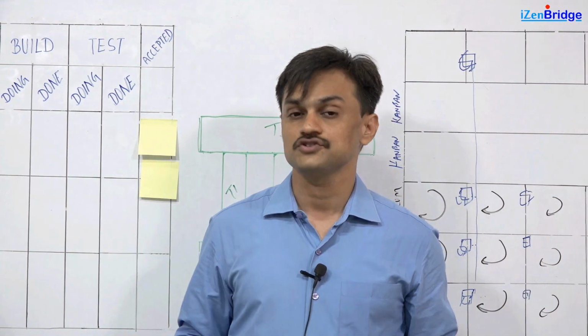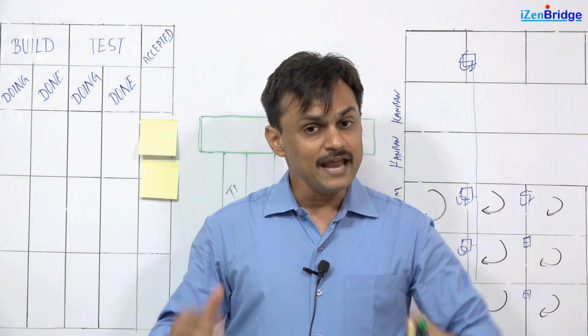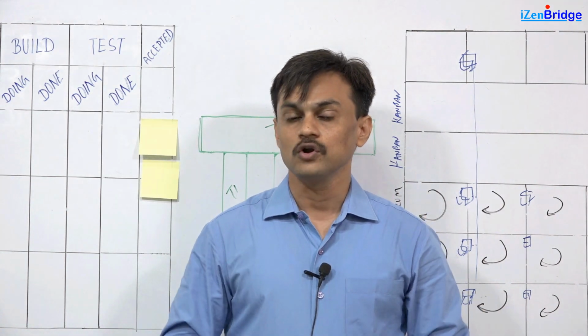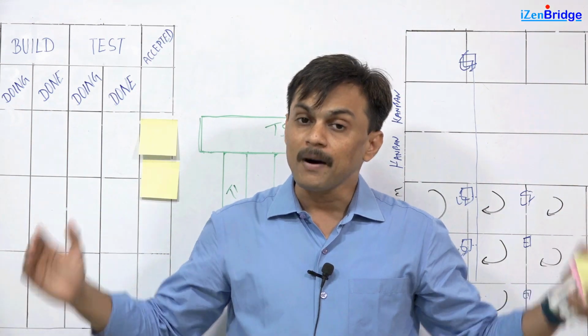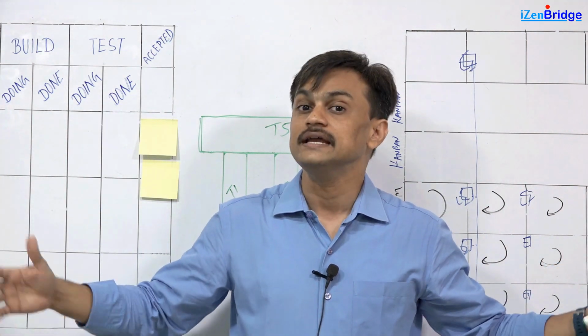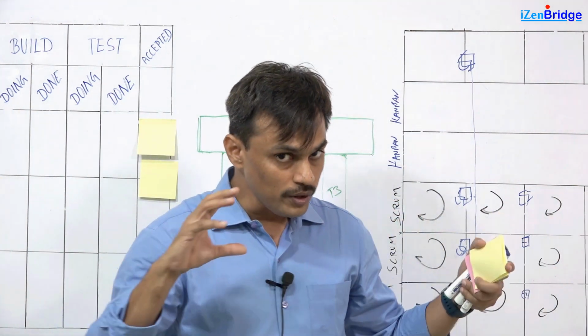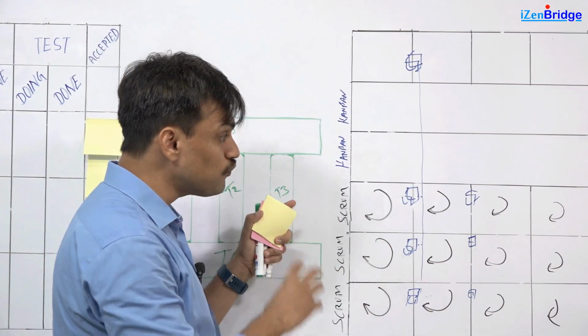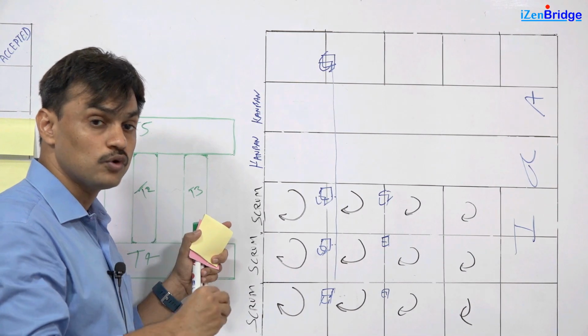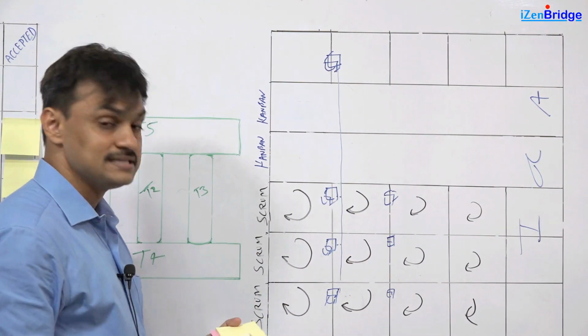Now, there are some constraints. The Kanban team in SAFe still needs to follow the overall framework of Scaled Agile Framework. They are part of the release train. They are not independent teams. Now, in order to participate in the overall release train, they still need to do planning and forecasting at a PI boundaries level.